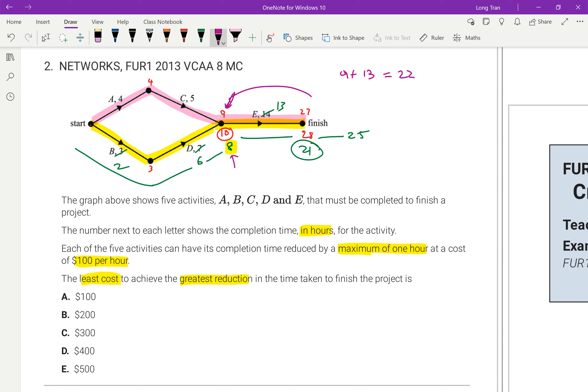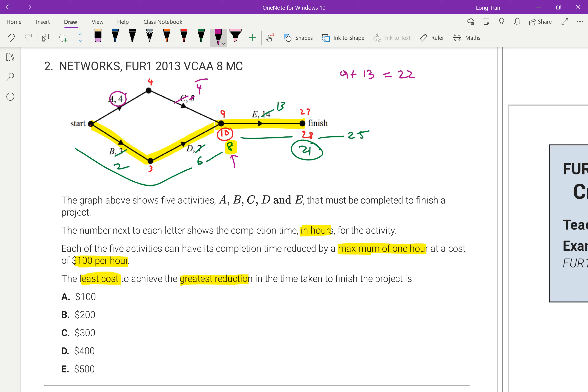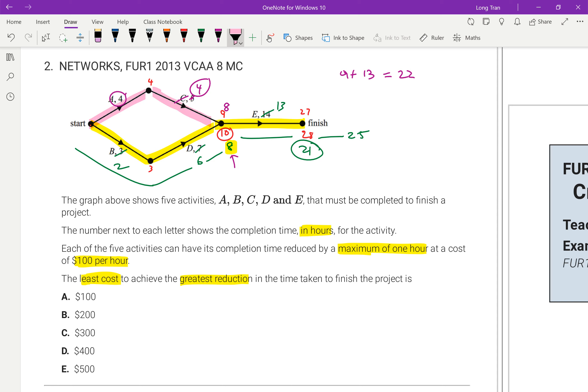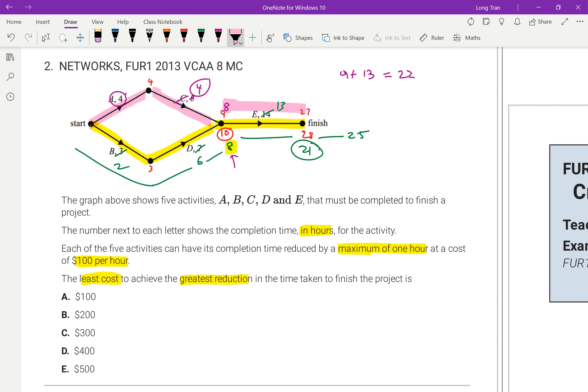So I remember each activity I can only reduce once. So if I've done that, what you can see here is that if that's nine, maybe what I can do is if I want to get down to 21, I may have to then reduce one of these ones. So if I reduce the C or A, doesn't matter which one, but if I reduce it down by one, let's say it becomes four now. Can you see now four plus the four gives eight as well? So that changes the fact that this now becomes a critical path as well. Four and four now gives me the eight that I wanted before. Whilst this is two plus the six gives me eight as well, because that's the minimum point that I can reduce down to. So eight is the key part. So eight plus the 13 that I reduced, eight plus 13 is now 21.